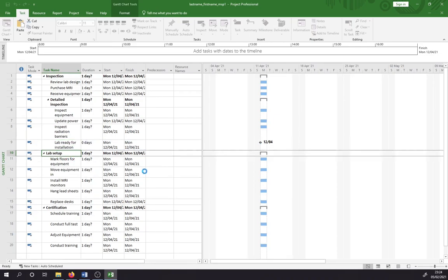You can see by default the duration is set to 0, because it doesn't add anything to the overall time scale of the project. It's just a milestone, so it's kind of like a marker, so we don't need to actually add any date. On the Gantt chart area, which we'll see later on, it's highlighted by a little black or dark grey diamond. So our milestone is going to be there. We'll set the date later on, we'll make it look a bit better.